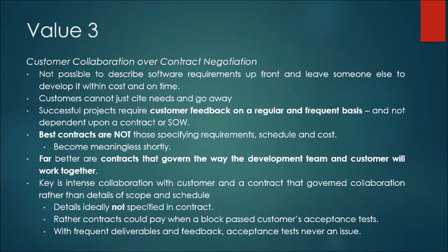The best contracts are not those specifying requirement, schedule and cost, because they will become meaningless shortly. Why? Because they are not going to stay for long, for the simple reason that requirements will change tomorrow. Why? Because everything else is changing. Far better are contracts that govern the way the development team and customer will work together. Collaboration should be the focus, that is how you are going to be with the team.